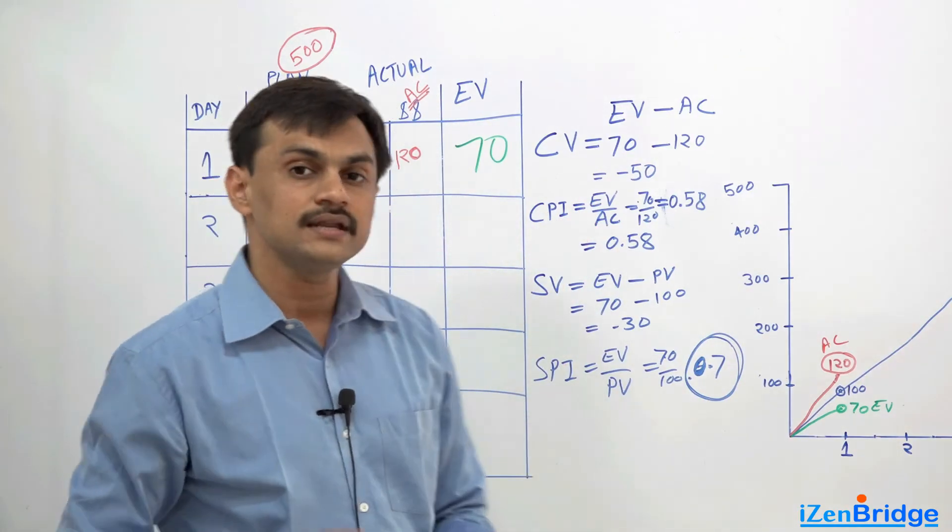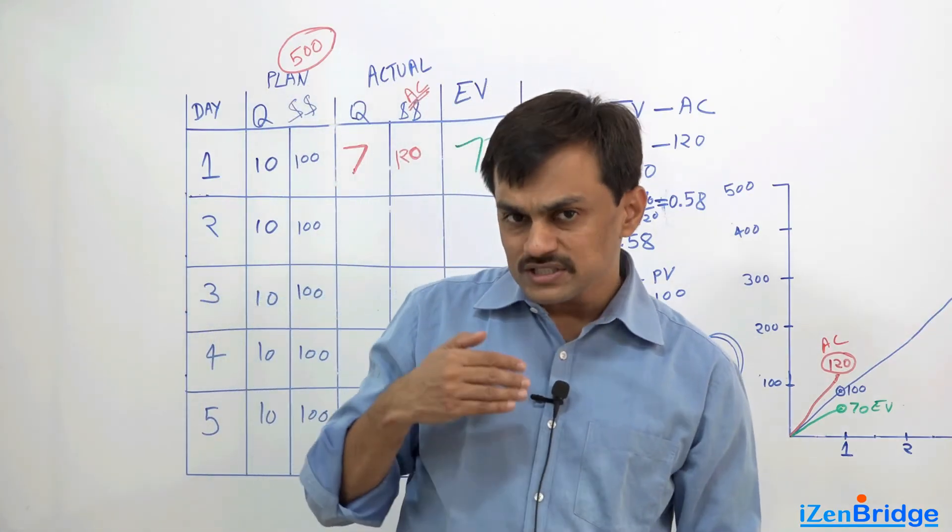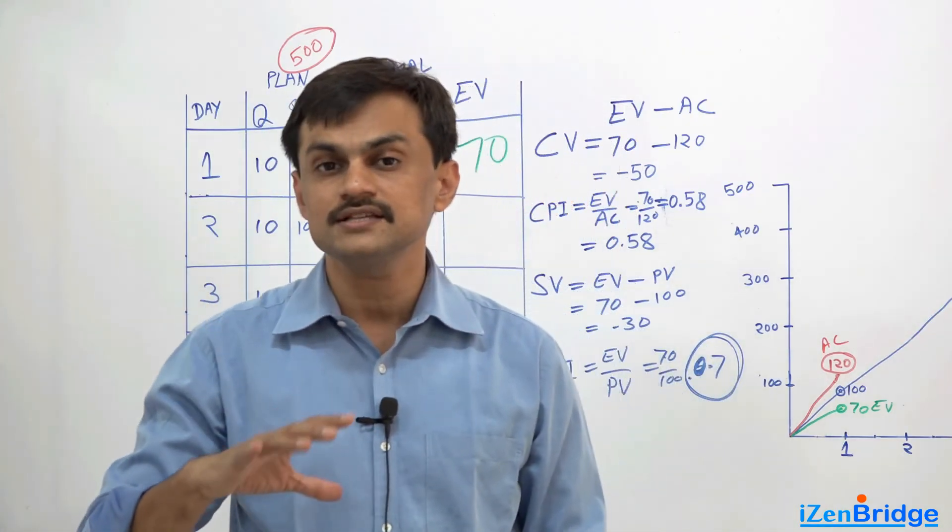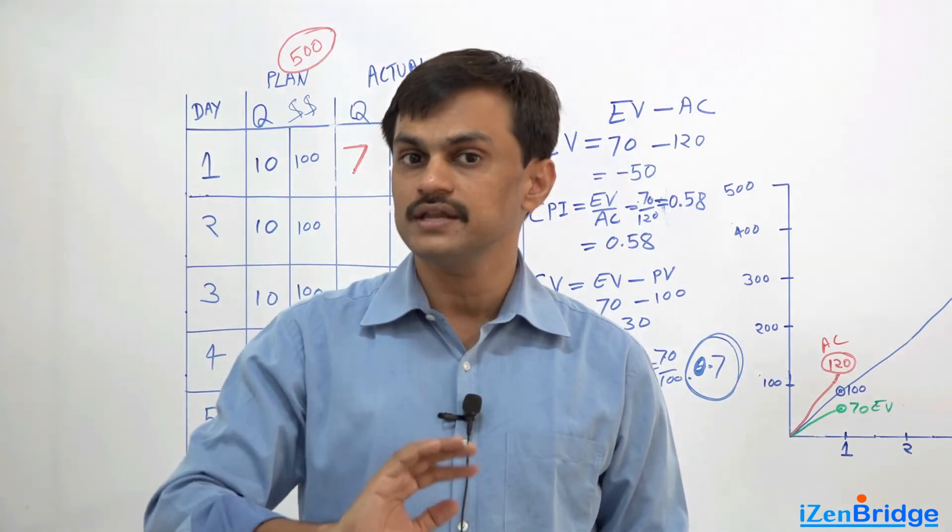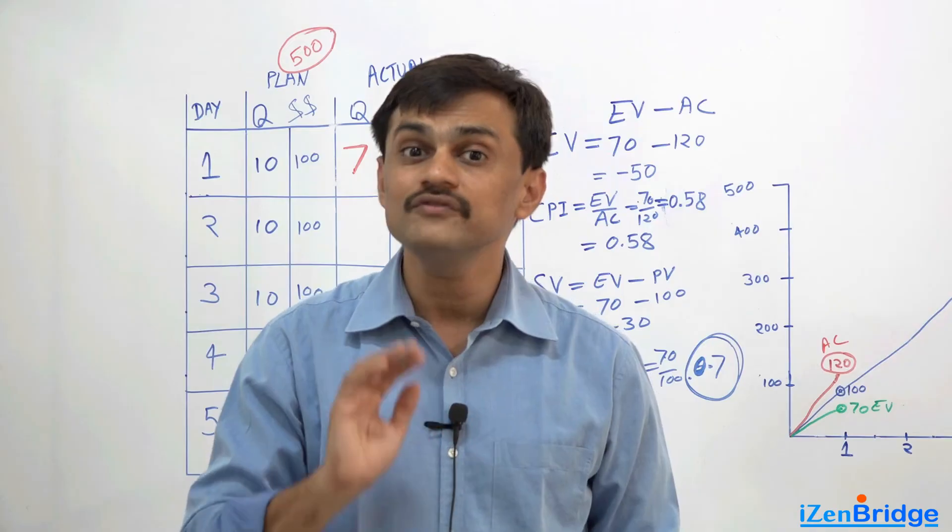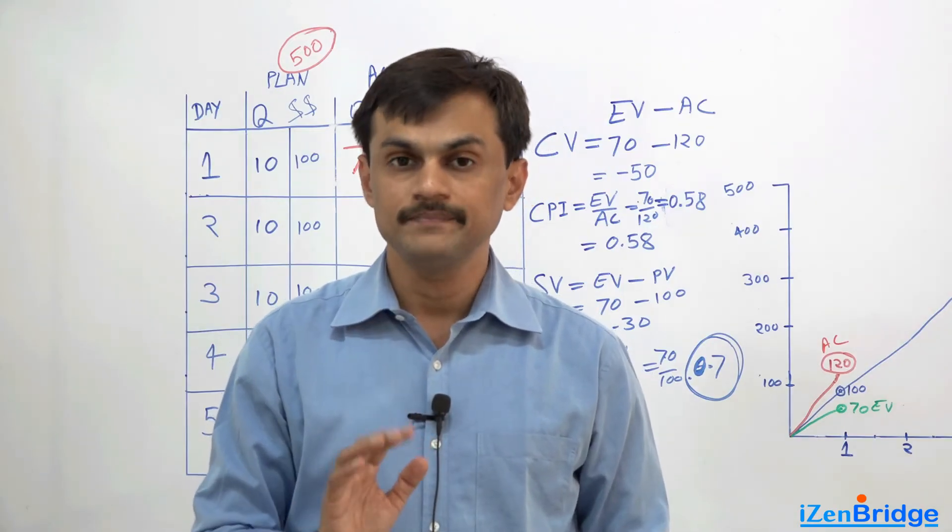So we use schedule performance index to identify, as a percentage wise, how much percentage we are completing our work against the plan, and we use cost performance index and cost variances to figure out how well we are making use of our money.